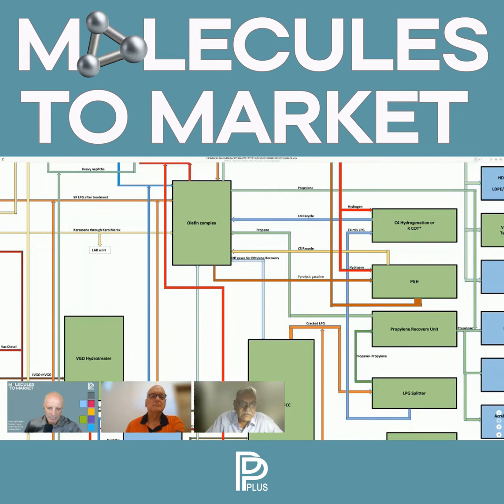But transparently, all the costs committed on actual purchases, actual contracting, will be shared between the consultant, the contractor and the owner. All files will be shared, and the contractor will be paid a certain fee for the services which they render. But the contract would be total costs incurred plus the contractor's fee, that is the lump sum cost, EPC cost.